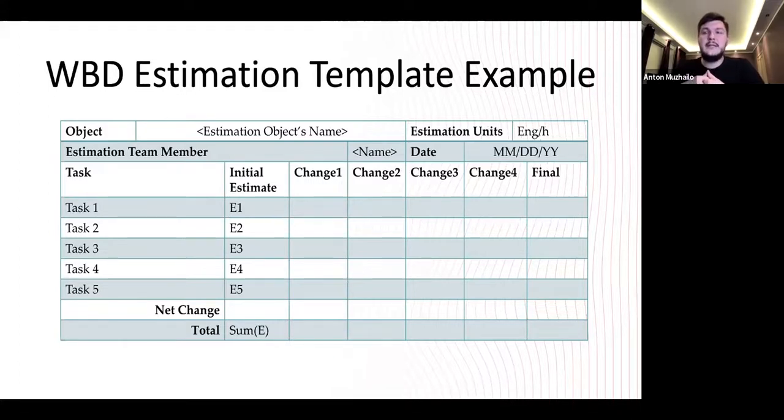And why it's important to do that offline, because each of those people can think more, can read some documents, can refresh their own memories, to do the proper estimate. Because if you do it online with everybody in the meeting, somebody can think very fast, somebody may have a hangover and just think very slowly. Some person can do it fast, some person slow, some person may need to remember something or read some documents, and everybody wouldn't wait for this person. So this is why it's better to do it at home or in off-meeting time. So this is why we need this estimation.